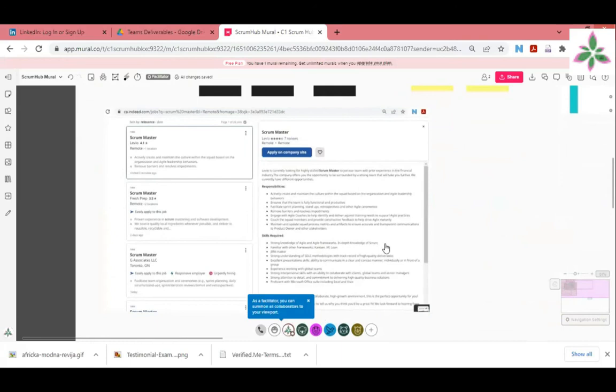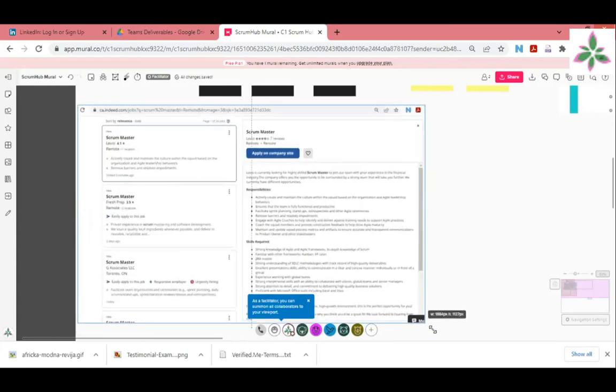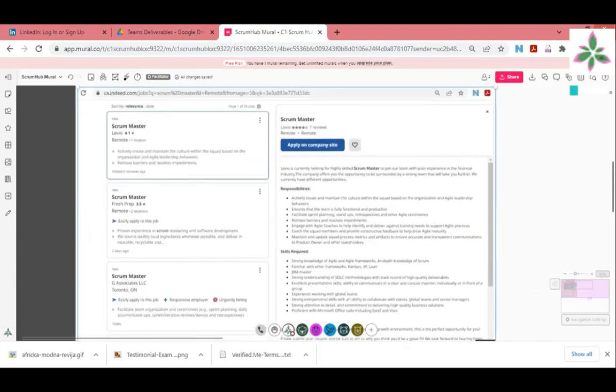Okay, so some people refer to that particular discussion as Sprint Zero, but for me, I'm always about the Scrum Guide. The Scrum Guide doesn't recognize Sprint Zero. However, in my own experience, it is the PO. The PO owns the product, everything about that product, visibility, clarity, leadership about the product, right? He doesn't lord over the team members, no, but he owns the product. He's responsible for maximizing value from that product. So it is the PO that is responsible for creating the product canvas.